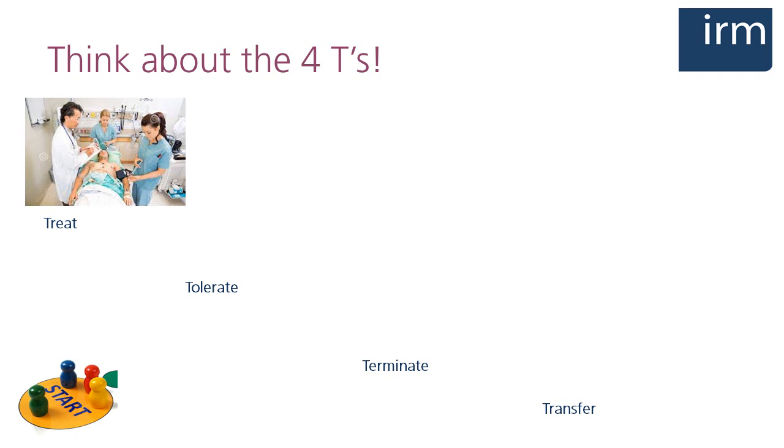Now, this might be because your charity has a low profile, or it could be that your fundraisers just aren't very good, and you'd need to do something very different to address the risk in each of those cases. So what you're saying then, Rebecca, is that we need to think about what would cause the risk to occur before we start to decide how to treat it.